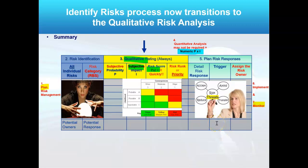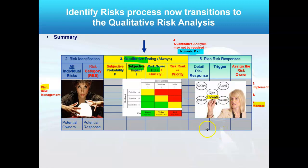There are responses we can do to threats. Remember, risks by definition are uncertainty — they're either a threat or an opportunity. If it's a threat, the common responses available to you are: you can accept the risk — nothing you can do about it. You can try to avoid it by not doing the activity that leads to the risk. You could reduce the risk with mitigations, like tying yourself off if you're climbing higher. Or you could transfer the risk — for example, to insurance. We do this all the time with car insurance; we transfer the risk to the insurance company.